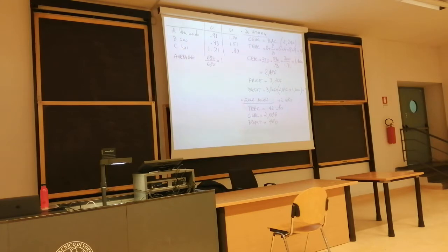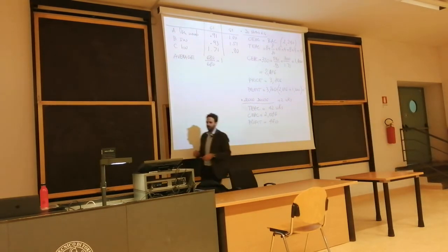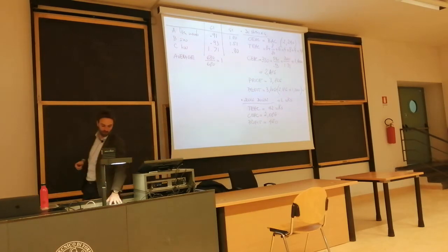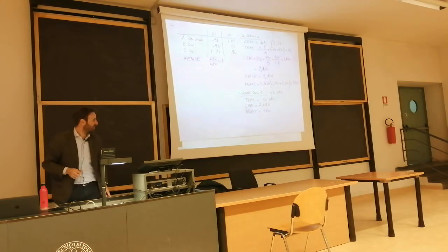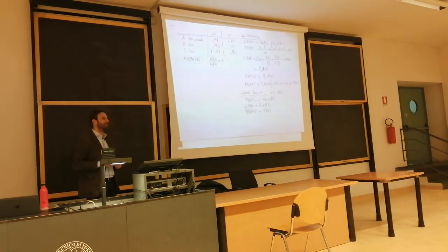We save 50,000 slowing down, but 30,000 overhead, so there's 20,000 saving a week. And we could have, instead of 420, 460 as a profit, which could be a solution. So we don't need to hurry up, but we just need to slow down by 2 weeks and still not incur the penalty.